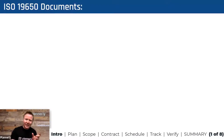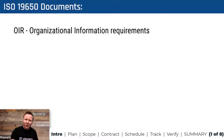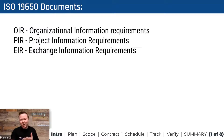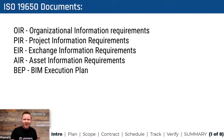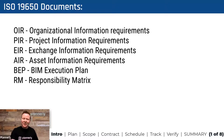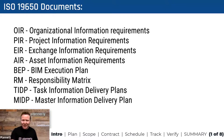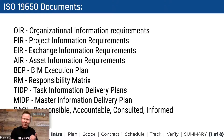As a result of that workflow, we end up with a set of documents as well. Those documents range from organizational and strategic-based information requirements, through project information requirements, exchange information requirements, asset information requirements, BIM execution plans — pre- and post-appointment — pre- and post-contract planning so you can execute with methods and procedures, responsibility matrices at a high level or detailed level, task information delivery plans, master information delivery plans, RACI charts — who's responsible, accountable, consulted, informed — and many others.